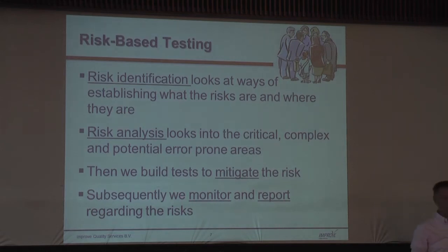The last introduction slide. Looking at risk testing, you have a number of phases, and I will come back later on in the techniques I'm presenting. Identification, analysis, mitigation, and monitoring and report. We first identify the risks, so what are things that can happen that make me not sleep, basically? Or where do I think these defects, these social creatures are hiding? Identification. Then we analyze them.